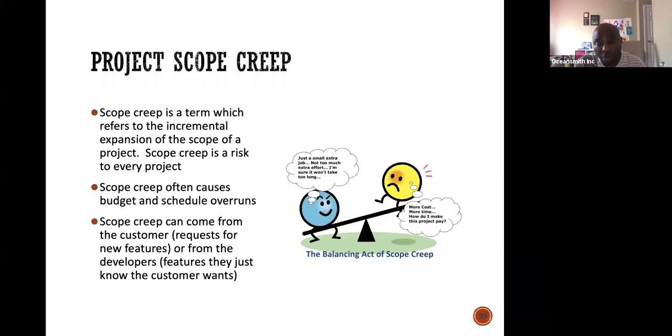So therefore, we will not release this product in 3 weeks' time. Maybe it can be 5 weeks' time. And also, if the new requirement is going to impact resources, maybe we have to look for another resource from another department, it's going to impact the timeline too.